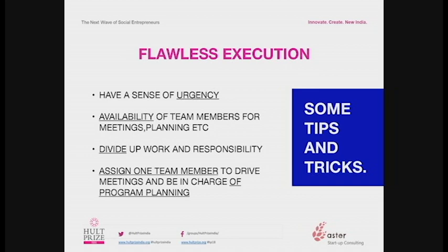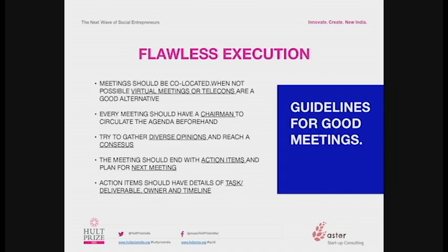And this is very important. Always assign one team member who will drive things. Need not be the leader of the overall project, but one person who will make sure everybody comes to meetings, keeps the plan updated, keeps track of who's working on which task, and keeps reminding people: are you up to date? Are you meeting your targets? Are we behind schedule, ahead of schedule? I would urge you to look within your teams and see what fits best for you.